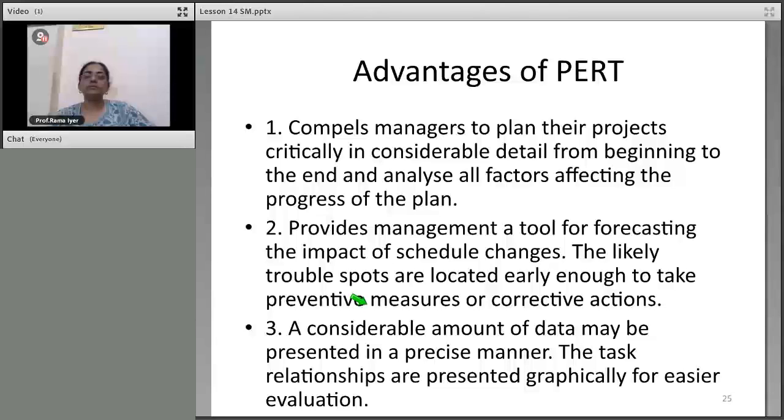Okay? Why is this less than your 45 days? Because you are doing your B and C together. You understand? That is why it is getting shorter than your 45 days. Now what you do is work out this based on the next example that is given. Your graph 2 is given, no? Based on the example, you work that out and you tell me whether you followed. Next time you can tell me.